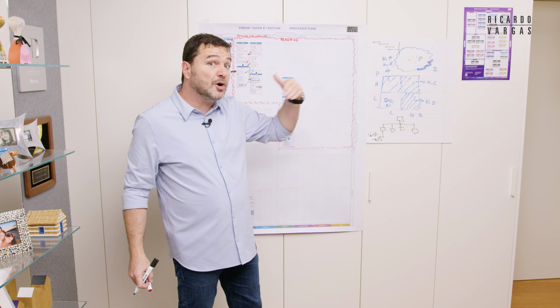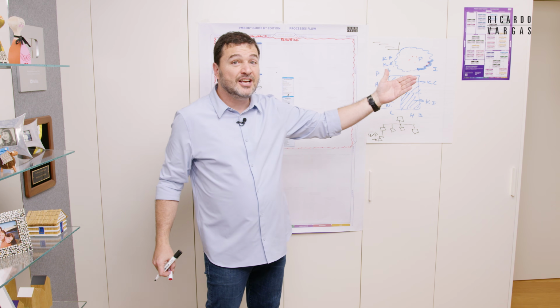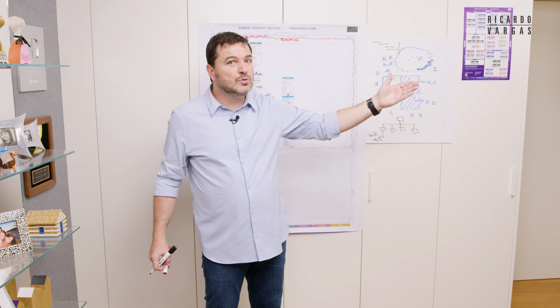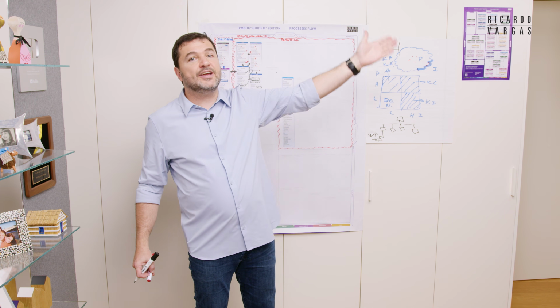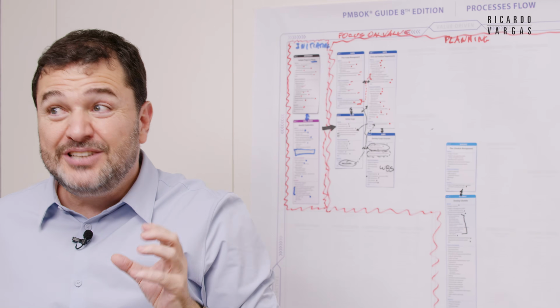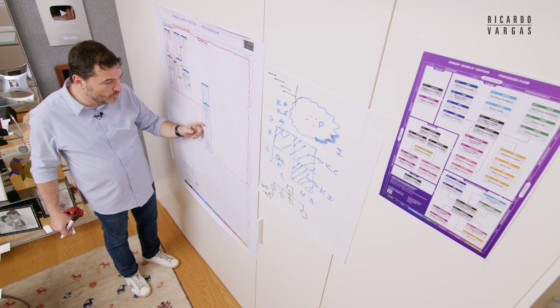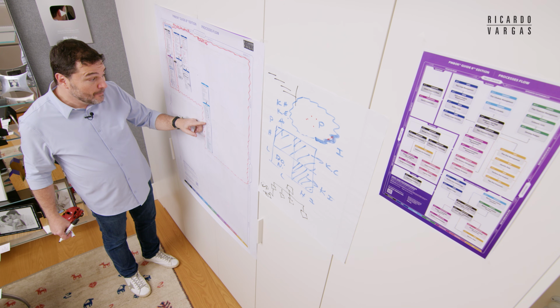Most of the time, if your project is 3 years, you don't detail your schedule up to hours 3 years from now. But you detail in hours what you do tomorrow, for example. This is the concept of rolling wave planning.